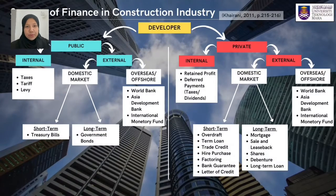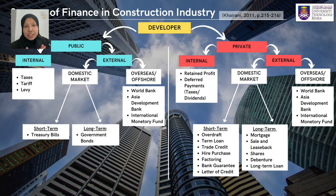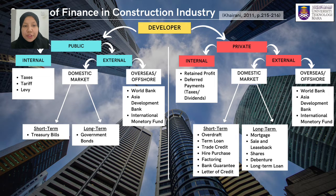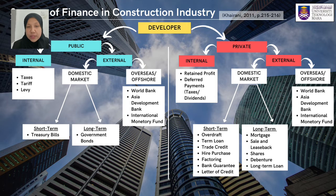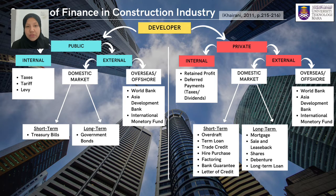I would like to explain about the sources of finance in the construction industry. These sources are best discussed according to the type of developer — public or private. Public developers such as the federal government, state government and statutory bodies can choose from internal sources such as taxes, tariffs and levies, or external sources. External sources are divided into domestic market, with treasury bills for short-term finance and government bonds for long-term finance, and overseas market, where developers can apply for loans from the World Bank, the Asian Development Bank, or the IMF.